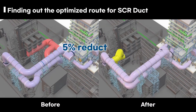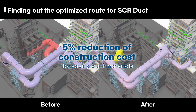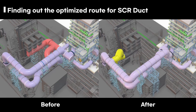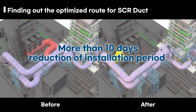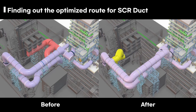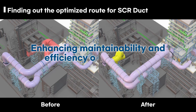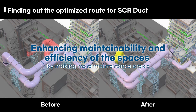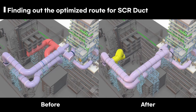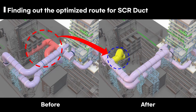Additionally, we reduced 5% of construction costs and more than 10 days of the construction period by saving construction materials and optimizing duct routes. We also enhanced maintainability and got efficiency of the spaces by making more maintenance areas. All of these were achieved by finding optimized duct routes from the sulfur absorption facilities to the SCR facility.